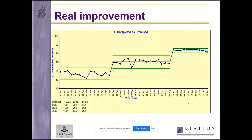You might think: just move out the end date and get better completion stats by spreading the work over a longer period. But this particular work was being done for a national retail chain with an assertive view of supplier management. If they say their store is going to open on the first of the month, you can be pretty sure it will. So moving the end date was not an option. How else might we apply this thinking?